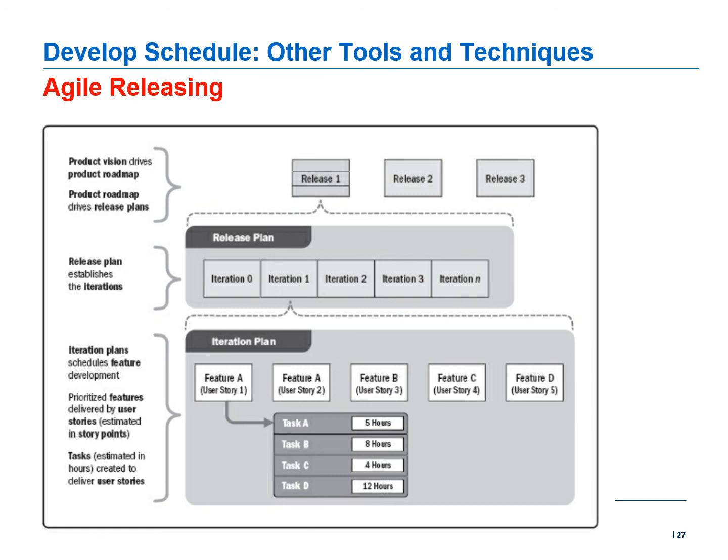So in terms of scheduling, what you do is you do a high level roadmap level planning, identifying the releases and the features that you need to include into each release. However, you take the immediate release that you are planning to release and do further analysis and scheduling. In this case, release 1 is what you are targeting to deliver within the next 4 months.